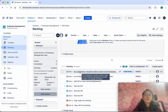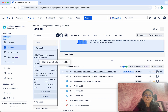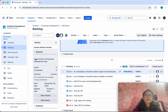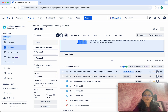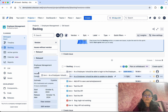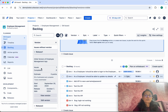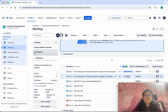If you want to associate a user story to a release, you can just drag and drop it and it gets assigned. I'm going to drag and drop a user story to Release 2. You can see one issue listed here and the other issue listed in the other release.